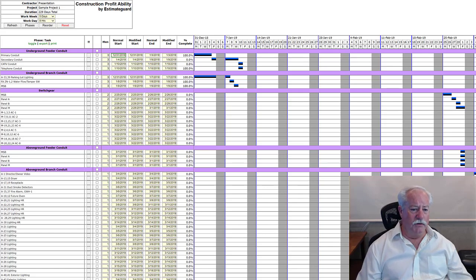So what you need to do is go through every one of these phases of construction, and consider what items you need to have in place prior to starting that work. Now, this is underground work, so here we would probably want a backhoe on site. If you're in the same position we are now with having to bed conduits in sand, you may want to have some sand delivered.